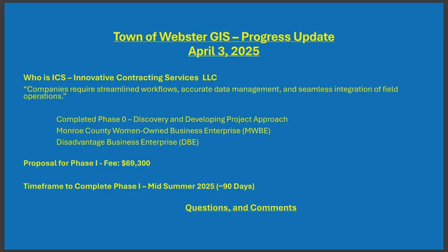We feel that this will have a completed phase one by midsummer. Now, all said and done, there's around 90 days of actual work, and midsummer is longer than that, but given vacations and the needs for them to produce information for us to review, give them feedback, and go back and forth through that iterative process, we'll be out into midsummer.